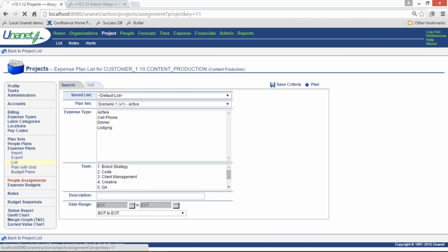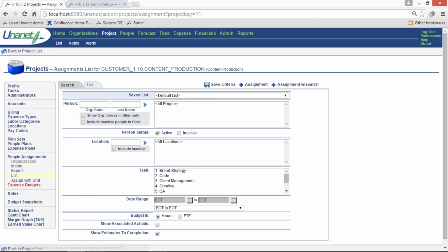And then the assignments, expense assignments and expense budgets are the authorization for those people charging time with the labor hours, labor categories, bill rate, cost rate, all the associated information, and charging time, and all that's calculated and collected against the time that's charged in the timesheet. Same with expenses as well.